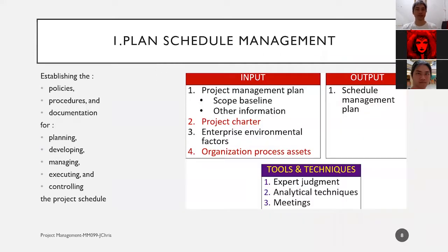Now, let's see. First, plan schedule management. Before we create the schedule itself, we must plan how to create the schedule, because plan schedule management is establishing the policies, the procedures, and the documentation needed to wireframe the actual schedule of the project.